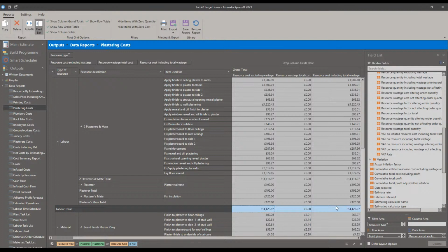So if someone says, I'll plaster the house for you for 12 grand, bonza, you're 2.5 grand up if they can do it. You can still put your profit markup on what they're going to do. You can still charge a customer what that is there, but you know that if you've put this job out to tender to some other gangs, and they say, yeah, I'll do the labor for that amount, you know that you can be in profit on that. If other people are coming to you and saying, okay, I'll do that for say 16 grand, and you haven't got your own gang resources to rely upon, you have to bring in subcontractors to do these things.